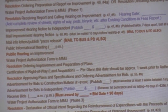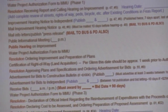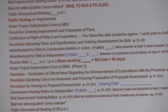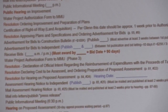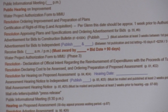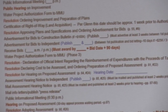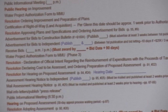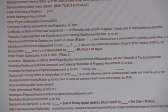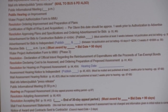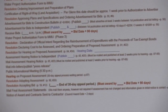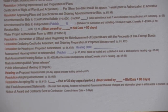We receive the report at the council again. All items shown in red are resolutions approved by the City Council as the project goes forward. They receive the report and call for a hearing on the improvement. We mail improvement hearing notices to everyone in the district that may be assessed, publish that in the newspaper, and also send notices to the bus company and police department, as both may have significant coordination issues.